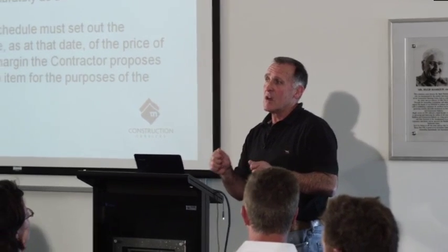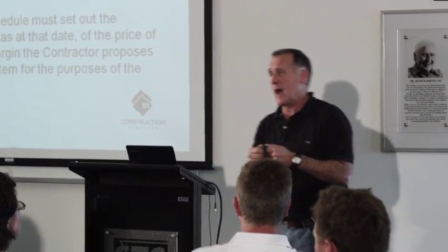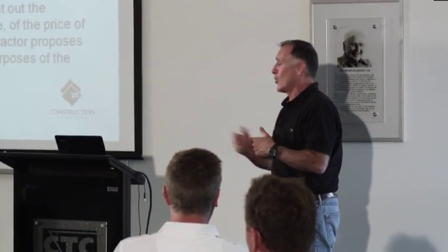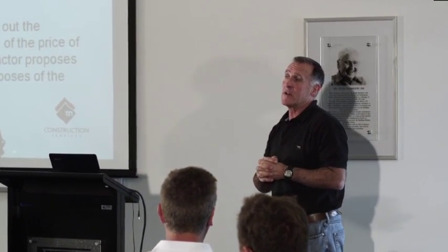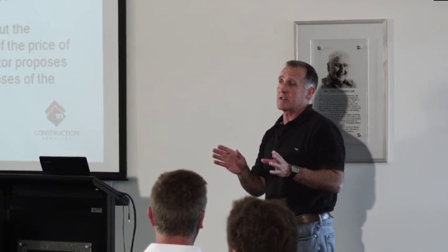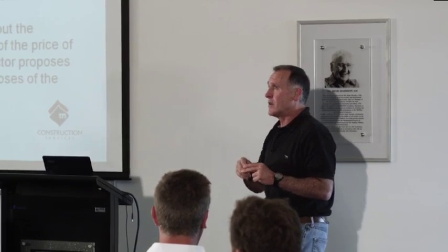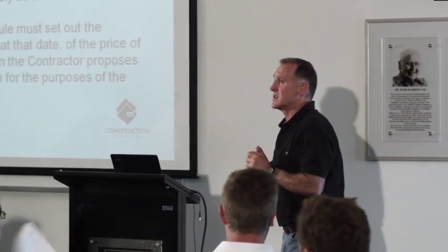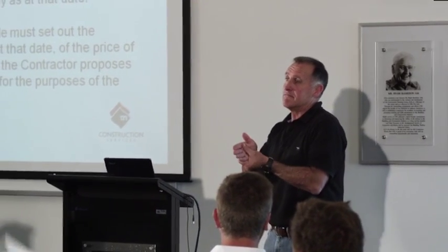So in that case, I'm going to be a little bit hard, and this is the way John would approach, and Paul knows this too. I would put the blame back on you, for not providing enough adequate supervision. You haven't spoken to your subcontractors to say, under no circumstances, and in the clause of owner's obligations, it does say that all communications must be with the builder and the builder only.